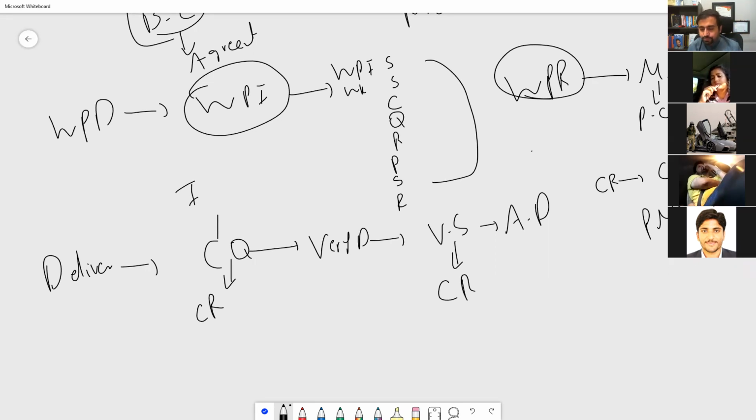If he thinks the change is important, he will do a detailed analysis of the change: how it is affecting the baselines, how it is affecting the deliverable. If it is not affecting the baselines, then you don't need a change request, you can do it yourself. After the detailed analysis, you send it to the change control board.